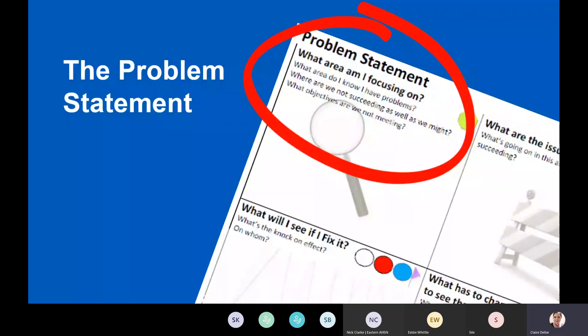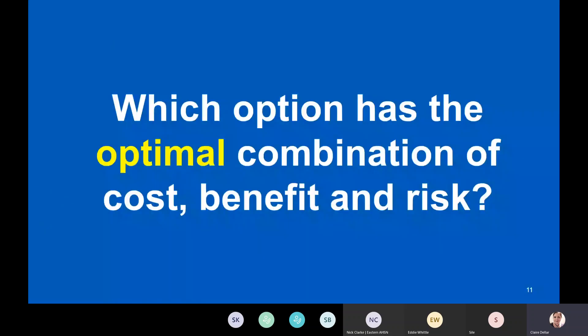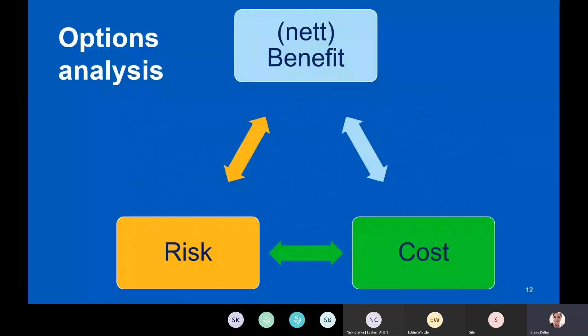The meaty one — the economic chapter — is options appraisal. The question you're asking is: which option has the optimal — not maximum, but optimal — combination of cost, benefit, and risk? Options analysis compares your total benefits minus dis-benefits against cost and against risk.